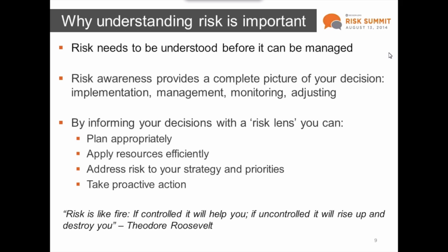Too often risk is minimized or ignored, or at best misunderstood. We heard from an expert at Darden Business School at the University of Virginia in a recent Decision Lens webinar about the application of certain biases to planning and decision making. Dr. Grushka Cocaine talked about a few concepts, one of which was the planning fallacy. The application of this concept to planning processes means that it is likely that projects will cost more, take longer, and deliver less than expected.